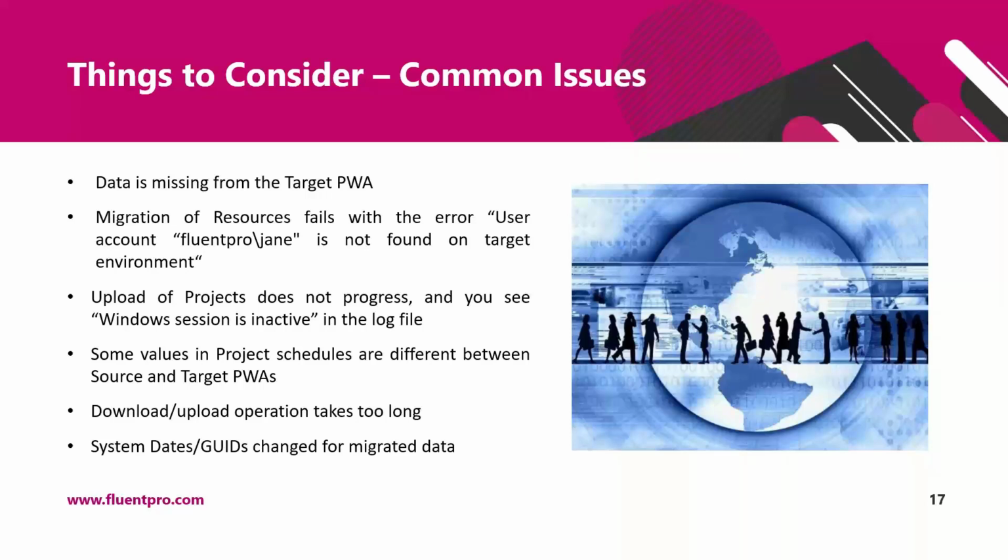The next common issue that we receive from the customers is that migration of resources fails with the error: user account is not found in the target environment. So when migrating from Project Server on premises to Project Online, or between PWAs in two different Project Online tenants, user account mapping is mandatory for resources upload.